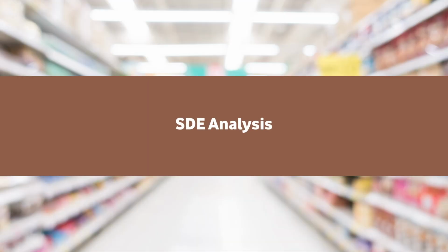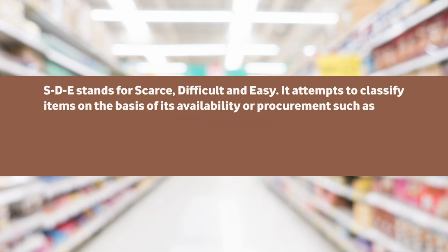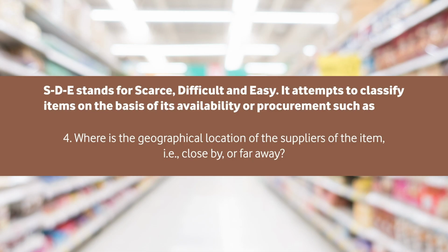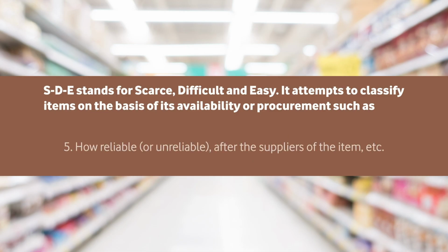The next analysis is the SDE analysis. SDE stands for scarce, difficult and easy classes of items. It attempts to classify items on the basis of their ease of procurement. The factors responsible are non-availability, how scarce it is, whether it has a longer lead time, the geographical location of the supplier, close by or far away, and how reliable or unreliable the supply is. By these factors, we can decide which items are scarce, difficult and easy.